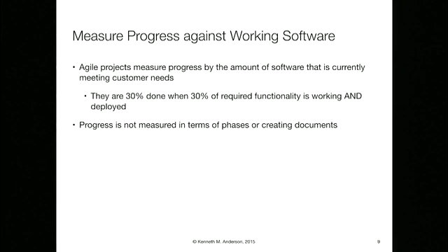So Agile software says, let's say you have 3 or 4 iterations, 2-week iterations, and let's say for whatever reason, something weird's going on. By the end of week 4, you have produced a couple of prototypes, but nothing has gotten actually into the customer's environment being used yet. You are 0% done in the Agile life cycle. So it has both a positive and a negative. But one thing that it does is a lot of these techniques don't allow you to fool yourself.